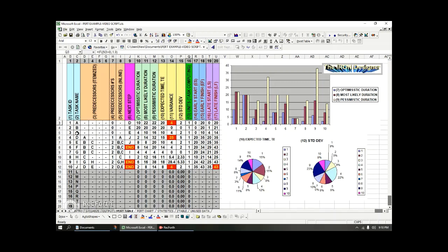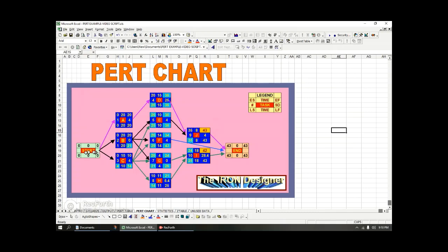And if you remember, ABC, they have no predecessors. So they kick off immediately, all in parallel. They kick off at the same moment that the project starts, okay? They all kicked off together. The colors, don't worry too much about the colors for right now. Obviously, the purple one is going to be the critical path. The other colors are just to distinguish between the arrows, so not everything overlaps.